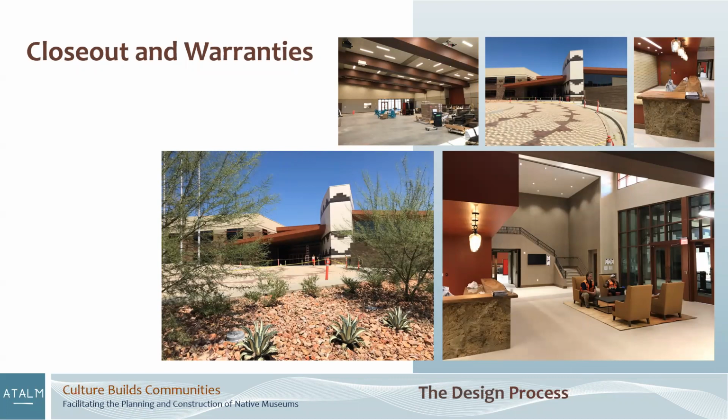So in that, closeout warranties are basically how the project closes out. It's establishing warranties. Sometimes there are project manuals that go into it from the mechanical side that show the owner how to operate and how to maintain the equipment that they've been given in the project. There's also a lot of callbacks. There's a typical standing from the contractor that they have to retain certain part of the fees so that they can actually come back and fix things that don't work.